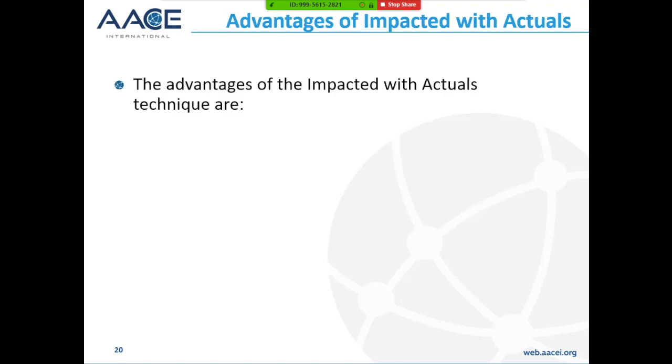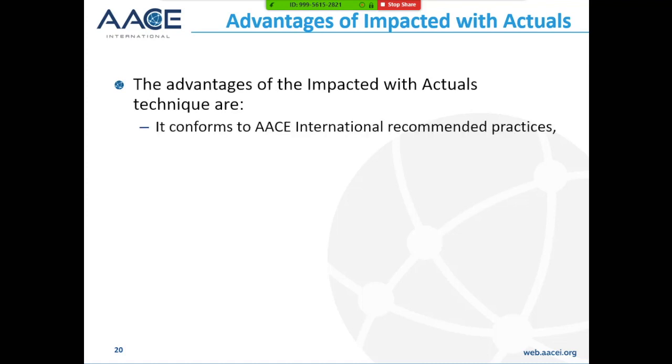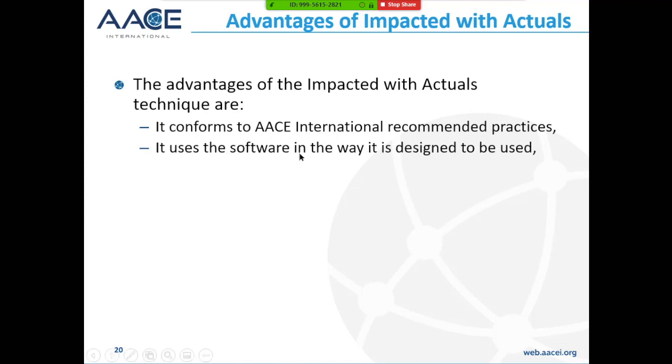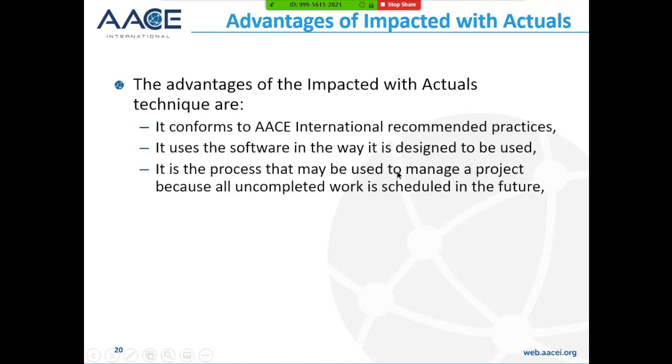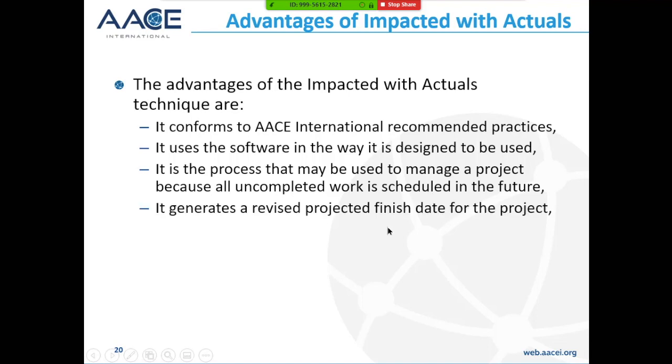This is where you're using the software generally as it's designed to be used, and you are complying with the AACE International standard, the standard for updating a schedule. So it informs with the recommended practice. It uses software in the way it's been designed. It may be used to manage a project because incomplete work is scheduled in the future where you expect to complete the work. It generates a revised project finish date for the project.